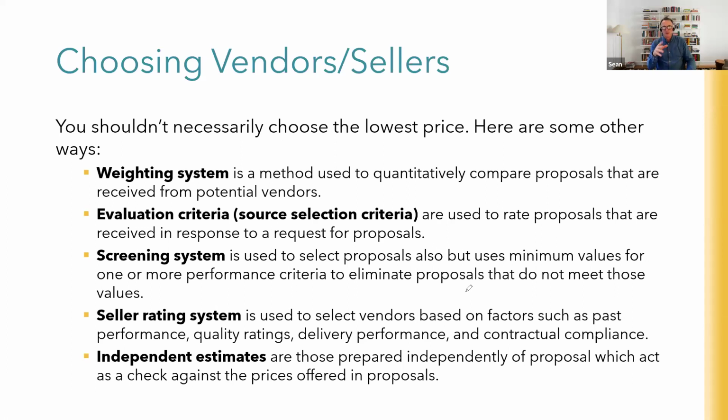We won't accept responses from people outside the country, or we won't accept responses from people who haven't been in business for more than 2 years. And you just screen them that way. Then you'll have your rating system. As we've talked about, it's combining all of these together. It's how you make the decision.